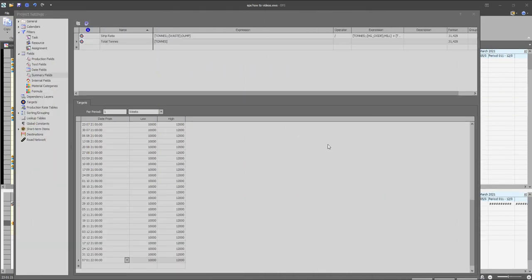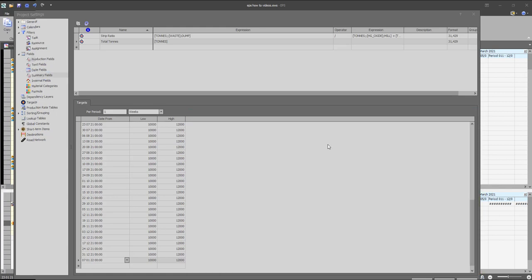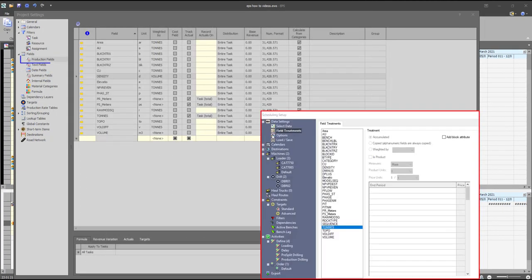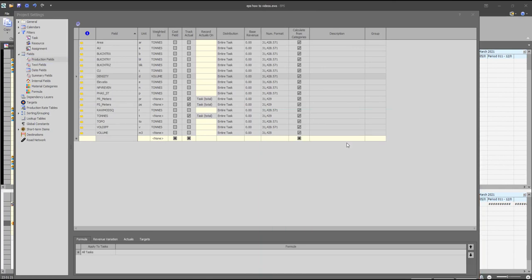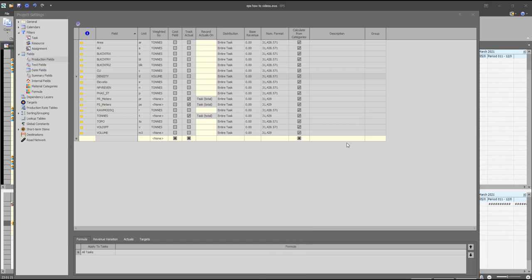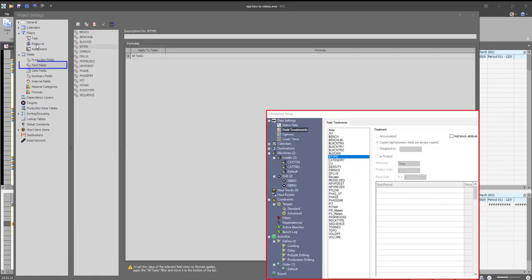The standard and global targets can be found on the summary fields on EPS. Accumulated fields on Studio OP are treated as non-weighted production fields on EPS. The weighted fields on Studio OP are treated as weighted production fields on EPS, while copied fields on Studio OP are treated as text fields on EPS.